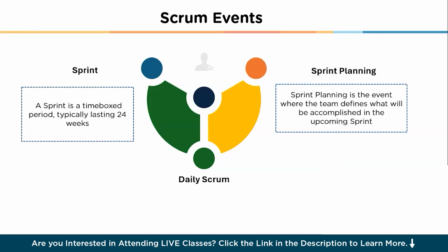During sprint planning, the team breaks down the selected backlog items into smaller tasks and estimates the effort required. This detailed planning ensures that everyone understands the work and how it contributes to the sprint goal. A sprint planning sets the stage for a focused and productive sprint.